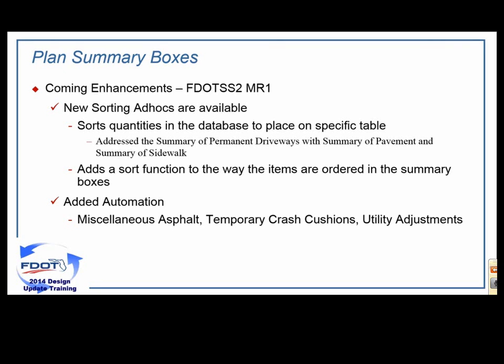It's all one pay item, 339-1, but if you look at the summary box, I had multiple columns that particular quantity may be separated into. So it may be underneath guardrail. It may be in like a trail type application. There were several different options.